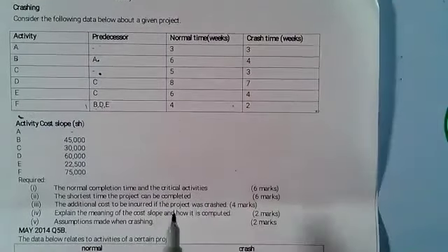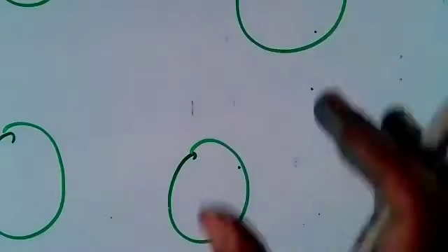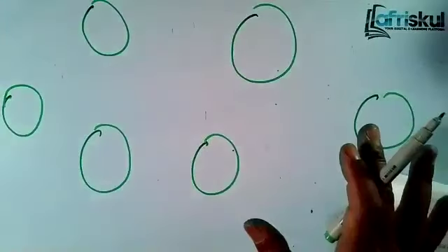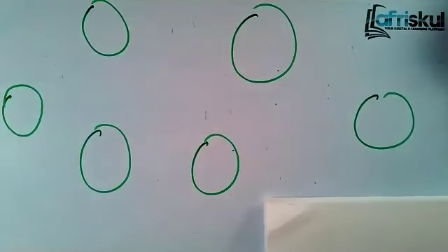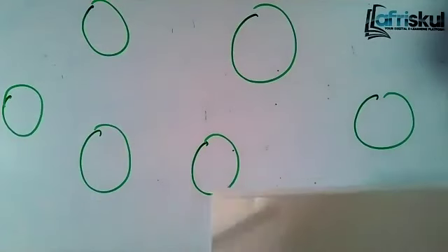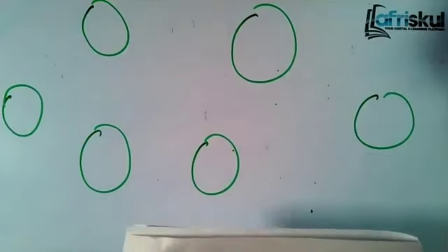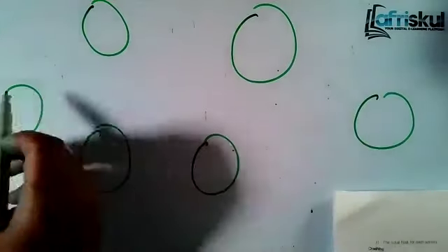So in an exam, you can draw the two separate diagrams like this. The first one you analyze using the normal time. The other one you analyze using the crash time. Or a shortcut. Let me show you how you can do. You can just combine the two. In an exam, you can just draw the two of them, or you can just draw one, you combine the two. So this is what I mean.